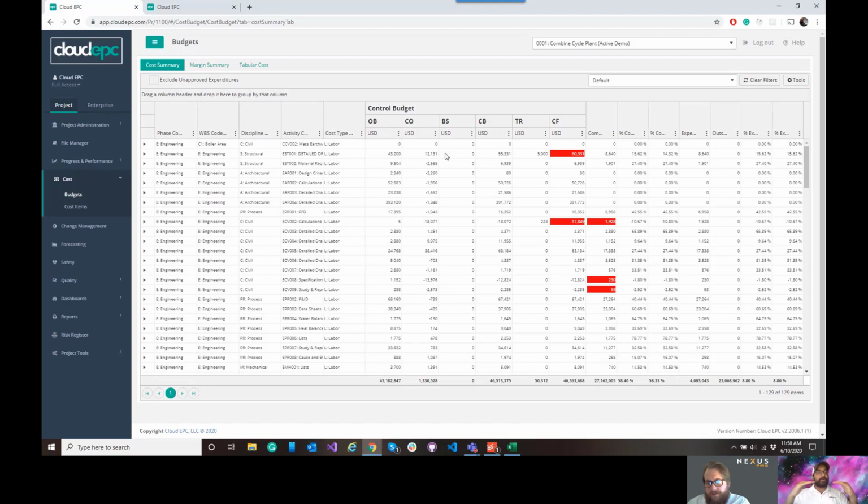And so this idea of our budget table being the bank account, if you will, and then we commit and expend from a cost module perspective against those budget line items. And then we can also create progress items or work packages against those that are loaded with an estimated number of hours and cost based on our standard unit rates, and track progress against them to create our earned value. We can bring all that data back up to the budget table along with our actual hours that we're spending, any actual cost,